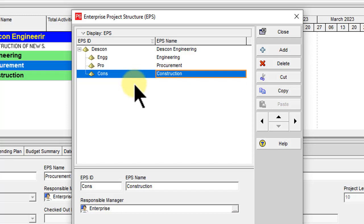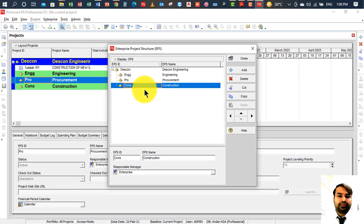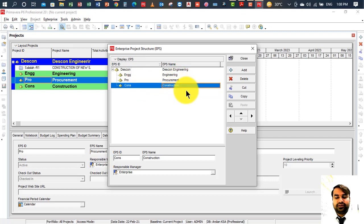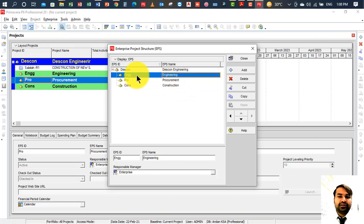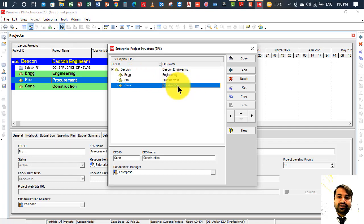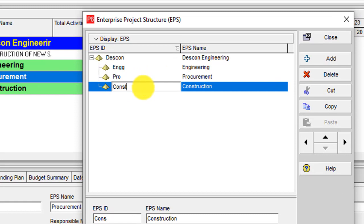In the left-side column you need to add the EPS ID, and in the right-side column the EPS name — a description and full name. For example, for Engineering we add the EPS ID 'ENGG', and for Construction we add 'CONST'.